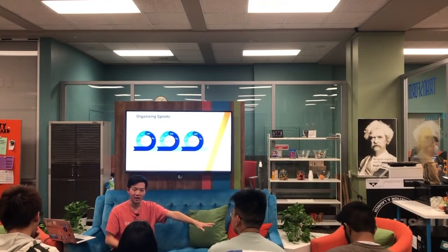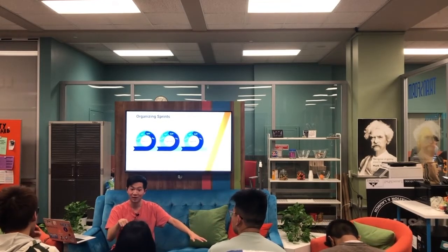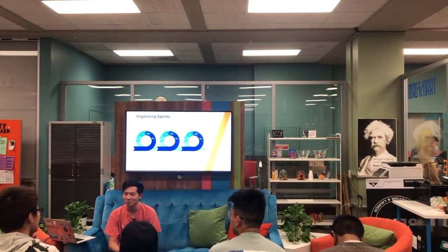So yeah, in terms of that, you can split it up. It's up to the PMs really. It's a collaborative role between engineers and designers, but they're going to be the ones who decide. If the bug's super critical and massive, then everyone's really going to go on that. You're going to move the other feature tasks to backlog and put bug fixing to do. But that should be pretty straightforward.